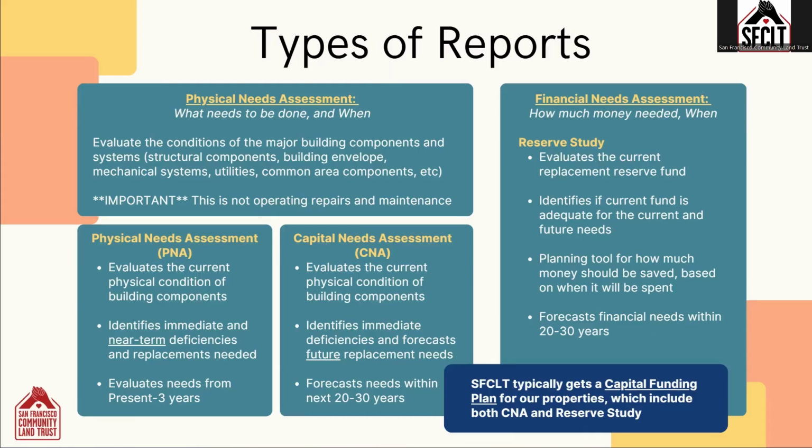It's really important to note that these physical assessments aren't capturing the repair and maintenance of components. So we're not talking about paint touching up, roof patching, light bulb replacements. This physical needs assessment is evaluating when an entire component will need to be fully replaced. There are two types of physical needs assessment reports.